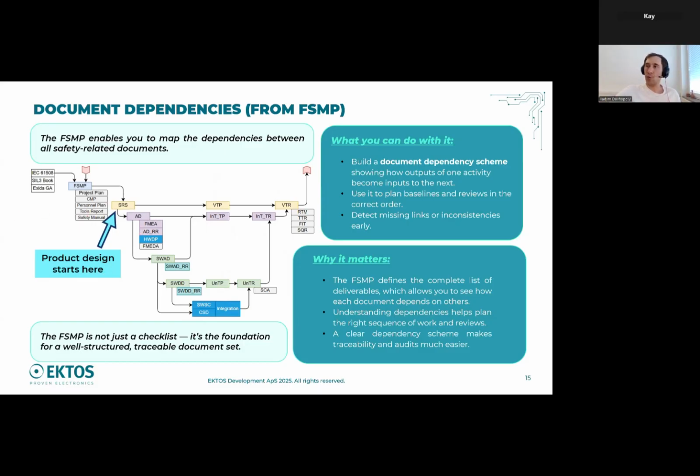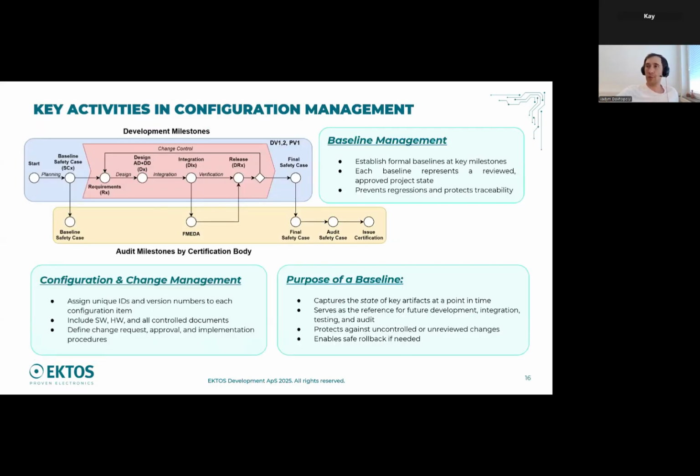Now the idea is to have a dependency between documents, and having them, we can put them into milestones or baselines, how we want to make a release of this one. And now we are switching to baselines, and logically we can collect the data like called baseline safety case, and it is what we are going to the assessor like a start point.